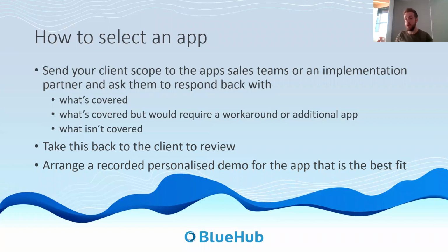Take this back to the client to review, have a sit down with them, and then once you're done, arrange a recorded personalized demo either with the app or with one of the partners so that you've got evidence again of what it will cover, what it won't cover, and everyone's working on a nice clear platform of truth of what's going to happen and what isn't. And again, this goes back to that point of memory, right? You're going to now be a few weeks into this project. If it goes well, we're moving into a couple of months of implementation and training. So it's really important that everything's documented, that we can all have a shared understanding between everybody.